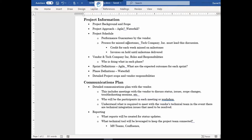What will be the process for missed milestones? This is where it can get more technical and detailed, and your company has to lead this discussion — because if the vendor leads it, they'll make the situation more favorable to them. Some components here may be credits for work missed on milestones. Another approach is to have a process where invoices are put on hold: the vendor sends an invoice, but you reach out to your finance group to hold it until the milestone is executed successfully. Once your project team approves it, you can unlock the invoice and have procurement pay the vendor.